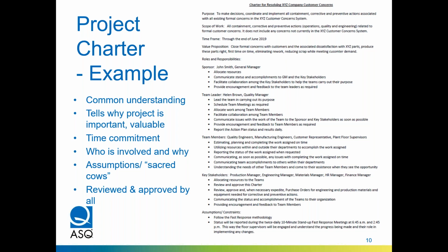A team leader, usually the team leader will work for the sponsor, but not always. But they are responsible for leading the team, scheduling the meetings, allocating the work, facilitating collaboration, things like that. And team members do the work. Stakeholders have a role to make sure that their portion of resources are available, and also to communicate more broadly within their organization what's going on.